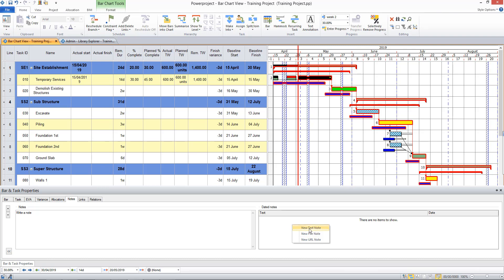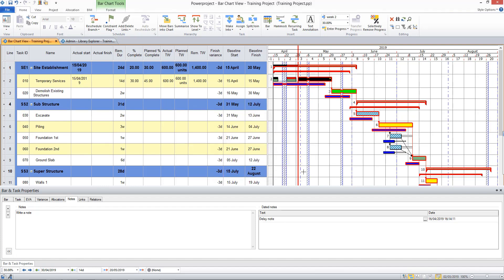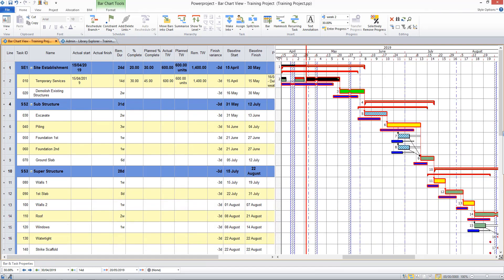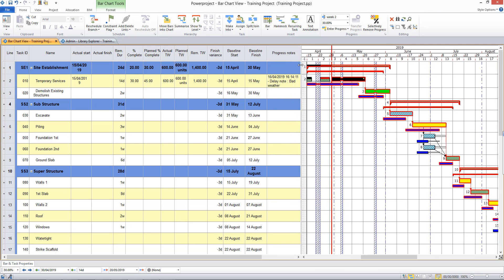So I can put a text note in here, and I might call it a delay note, and there's bad weather there, which has accounted for the delay. When I click OK, if I chose to show that column in my table, you can see that a dated note is displayed there.